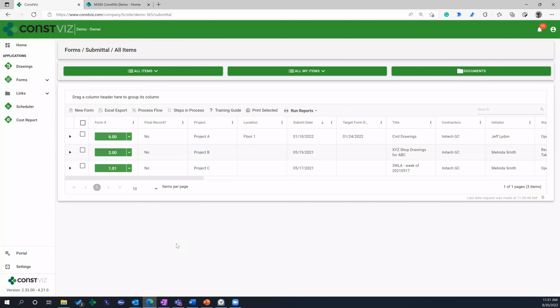The enterprise one is where you pick from a submittal register, meaning not everybody has this in advance. If you have your register already identified, and I'm going to show it in a second, if you already have your register baked out per the contract, you can load that up in advance, and then the contractor can only pick from those, and it pulls all that data into the form automatically. So it brings in all kinds of information: discipline, the dates of the submittal, et cetera. All that stuff gets pulled in. And we've also added the ability to status every single page of attachments in an enterprise form. And I'll get to that in a second.